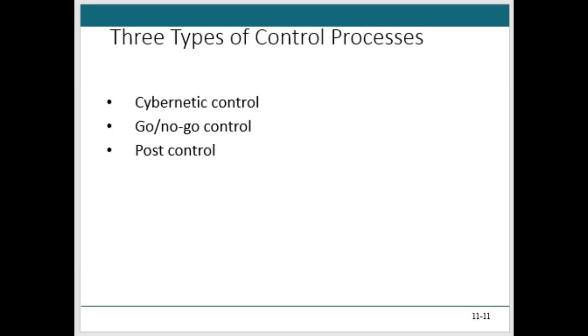And anything over $100,000 I can present to the change board for approval, right? So there are various levels, and we want to know how much can we allow, and where's the delta? If my variation is within $10 of planned on a $100 project, I'm okay with that. But if it goes over $10, it's more than 10%, I must make changes, right? That's how much deviation.